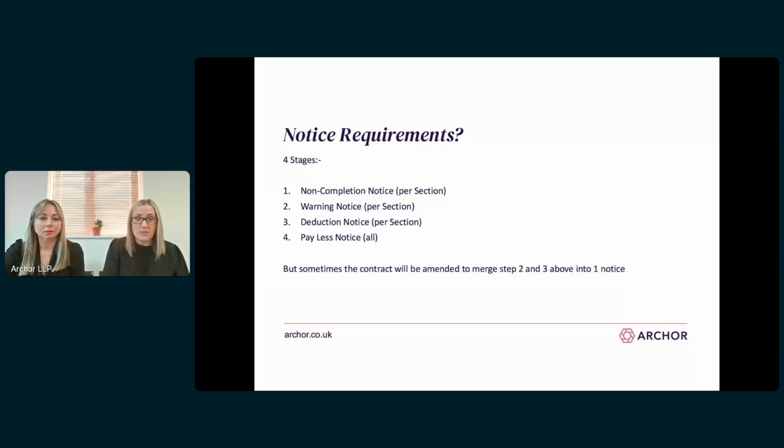The third notice is then referred to often as the deduction notice. Again, it can either be issued for the whole of the works, or if you've got sections, it needs to be issued per section. This deduction notice needs to state that the employer will deduct liquidated damages, or that the employer requires the contractor to pay liquidated damages back to it if there's nothing that they can deduct against. The fourth and final notice is then the pay less notice. So I know we've already covered pay less notices in previous sessions, but this is where liquidated damages are actually shown as a deduction against the contractor's account.